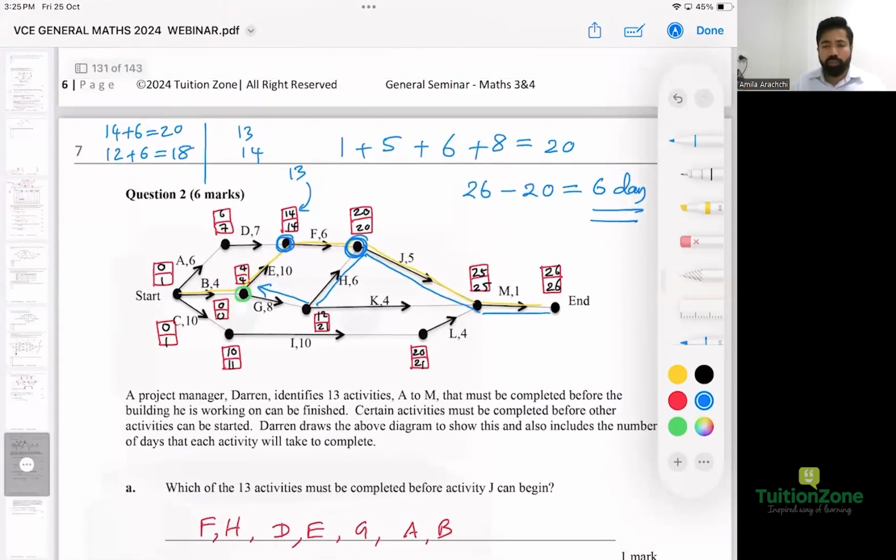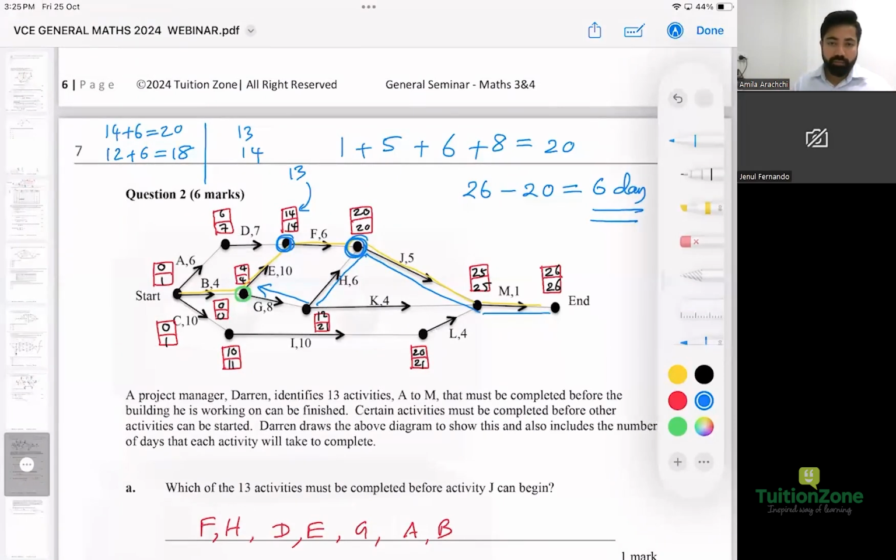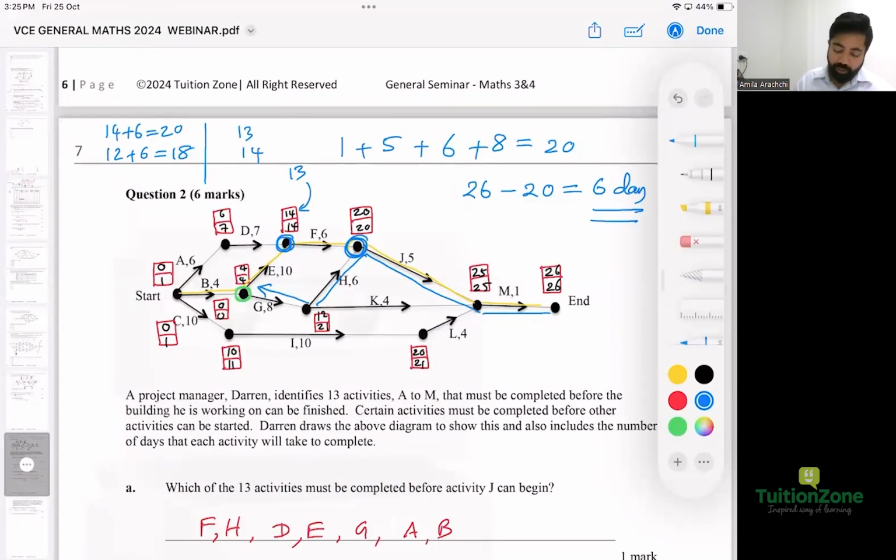I think I did more towards that one last week also in the lesson. Because we're checking how much you can reduce to be comfortable reducing. Otherwise, if you go less than that, you're spending money on it, but it's not going to change the completion time. Cool. All right. So that's why only changing the B by 1.